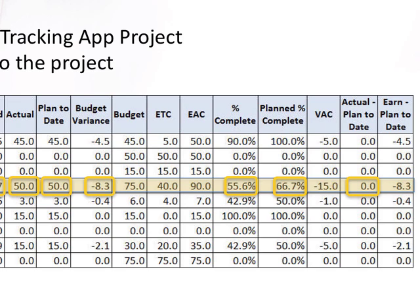Actual minus planned to date is at zero, which means that they said they would spend 50 days at this point in the project and they have done just that. However, as we have seen with the other metrics, even though they have spent 50 days, they haven't accomplished as much in those 50 days as they had planned. Earn minus planned to date also supports this — the negative value again indicates that it is taking more time to accomplish the work than they had planned.